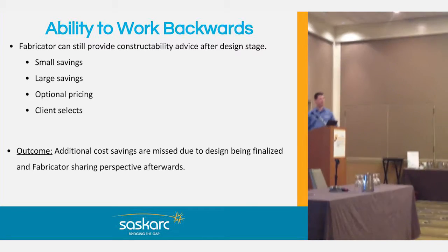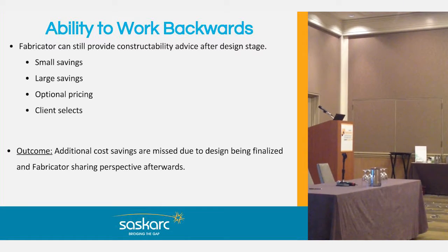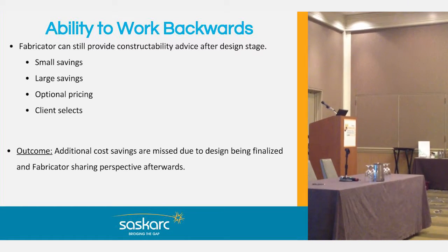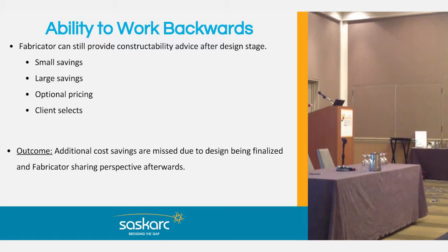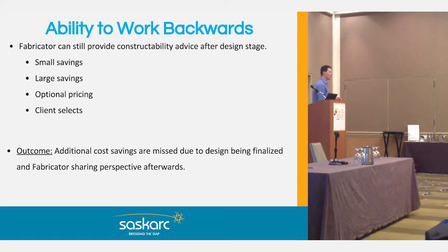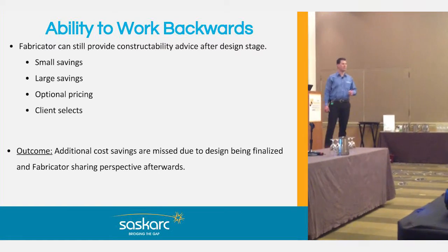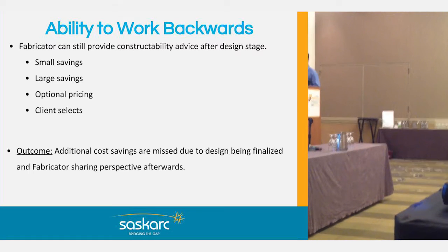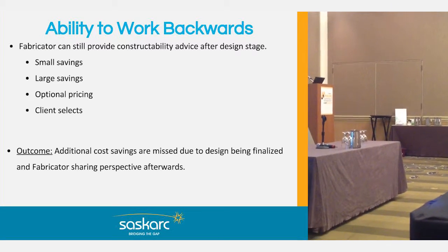And what we often find is they're very open and receptive to it, but they want us to quote the base quote so that they can compare it apples to apples with the other vendors, and they also want the optional pricing for what we're proposing. And when we provide that optional pricing, we're finding that in the main, they're taking it because they see the advantages, as we've spoken to today, of bringing man-hours off-site.